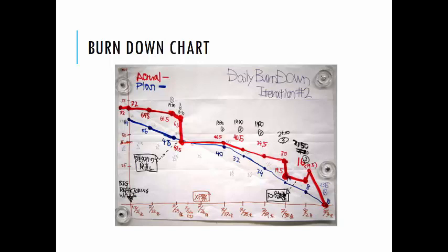Progress on a Scrum project can be tracked by means of a release Burndown chart. The Scrum Master should update the release Burndown chart at the end of each sprint. The horizontal axis of the chart shows the sprints. The vertical axis shows the amount of work remaining at the start of each sprint. Work remaining can be shown in whatever unit the team prefers: story points, ideal days, team days, hours, etc.